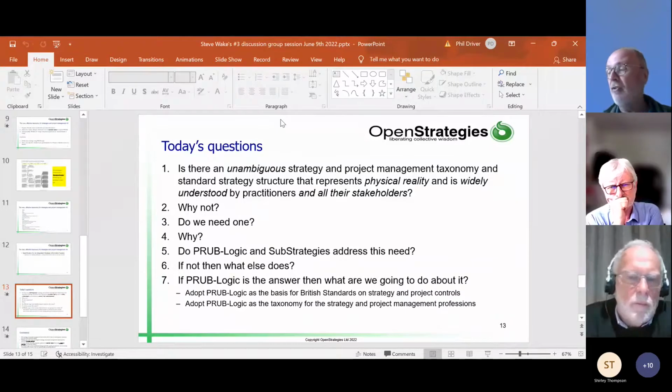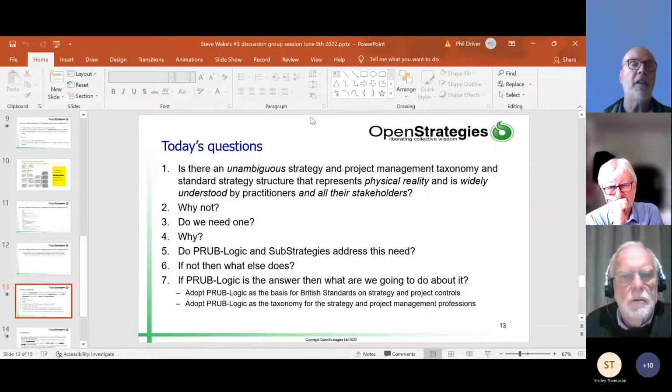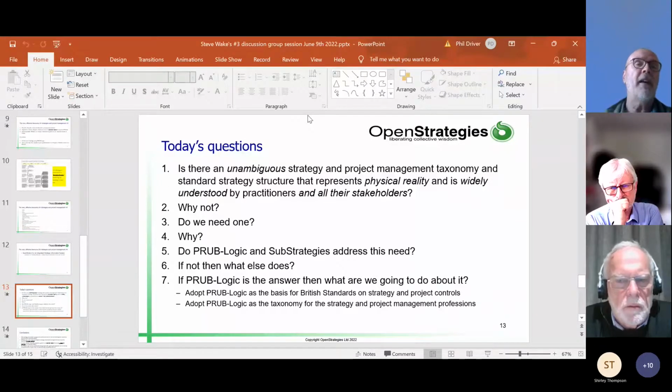But if you start talking collectively about what's the purpose, who are the stakeholders, what are the deliverables, what are the measures of performance, you might not get it exactly right, but if you have a go at that and then in your second meeting try to refine it, it gets everybody on the same page.